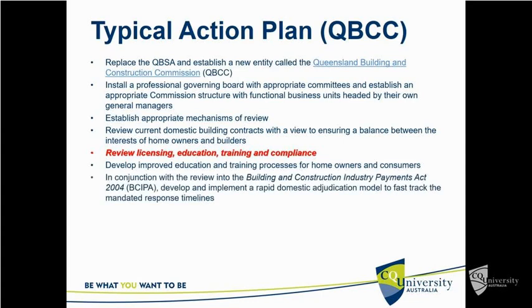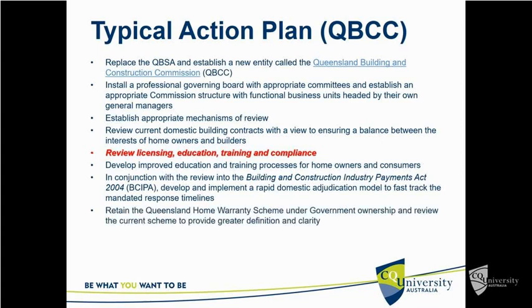And in conjunction with review of the Building Construction Industry Payments Act, where contractors and subcontractors, especially subcontractors, were not getting paid on time, they aim to develop and implement a rapid domestic adjudication model so they could fast track the response timelines. There are set legal timelines you have to make payments within. Retain the Queensland Home Warranty Scheme, keep it under government ownership.